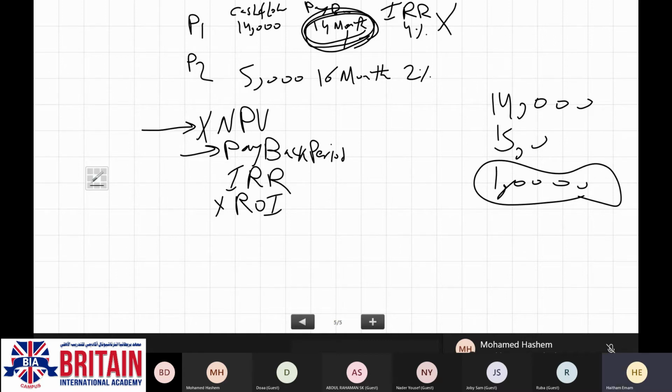When the NPV has a minus sign, then this project, we are going to ignore it. To find the NPV, you need to go back to the presentation and the recordings. When the NPV is minus, at this moment, I'm not going to take this project.